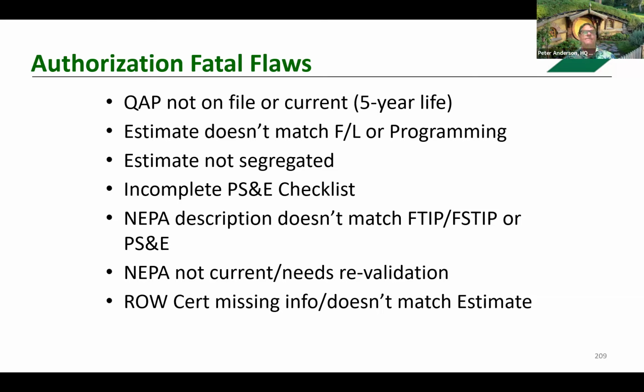By doing that, there should be no more costs associated with the project. It's possible there could be some CE costs within the internal. But the key thing here is that if that goes beyond that PED, those costs are no longer federally eligible. If you need to get those costs covered, you do need to do a PED adjustment.